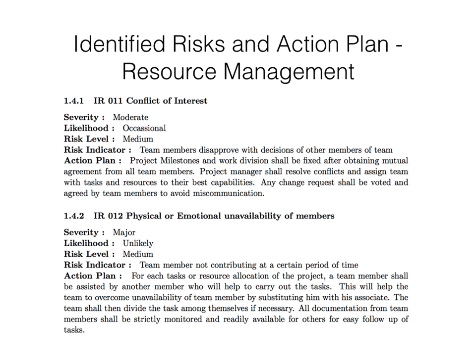Avoidance is not possible, but to minimize this risk, what we can do is for each task given to each team member, there is a backup team member that will help as an associate to the main team member to oversee the development of this task.